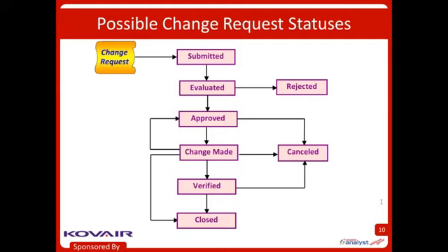So I think you might find it illuminating to track your distribution of change requests over time. And that'll kind of show you how much change activity is taking place and how quickly your team is responding to them. Now be careful not to define too many unique statuses. I was at a client site once and saw a person there configuring their brand new change control tool. And he set up more than 20 change statuses. And even if they're all plausible, the fact is no one's going to use those. So I think about 8 like this is probably plenty.